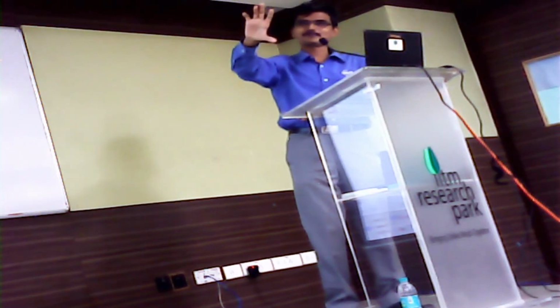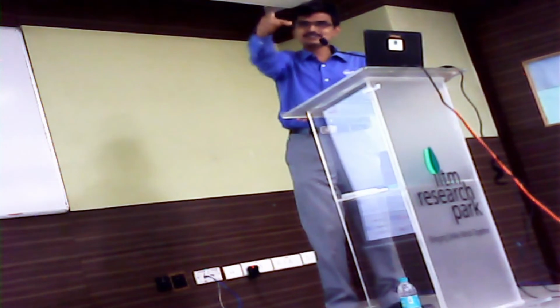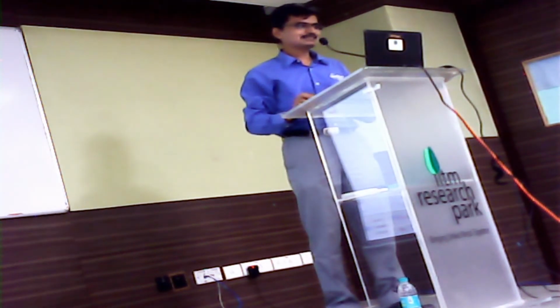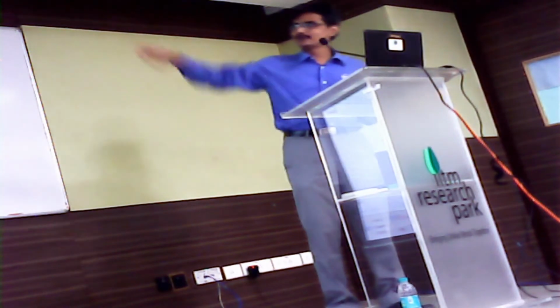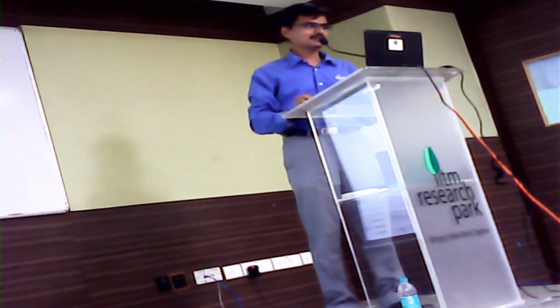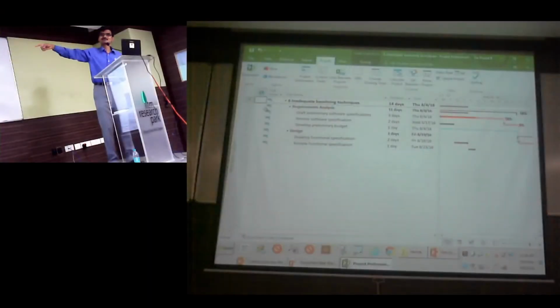Even then, the change request and affected activities should be baselined again. Correct. So the entire plan does not have to be baselined. Let's say these are the tasks that are getting impacted because of the change. The first step is on your entry table, which is your forecast, make the change. And then baseline it, not the entire project, but only the selected tasks.